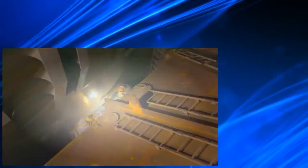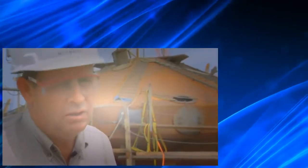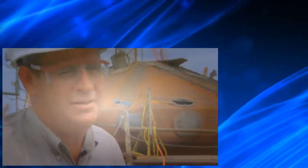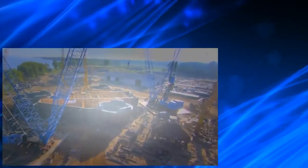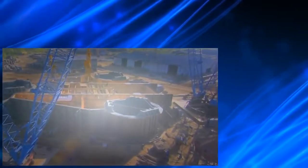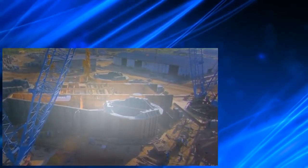After 3 long years, the shipyard came back with a sharp new focus on the bottom line. But then, on the first Tarzan rig, we were running way behind schedule and we had to work a lot of extra overtime and brought in a lot of contract labor to try to compensate, meeting the time schedule. So Bodie needs to cut millions of dollars off this rig's bottom line.